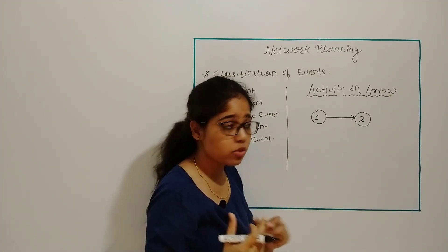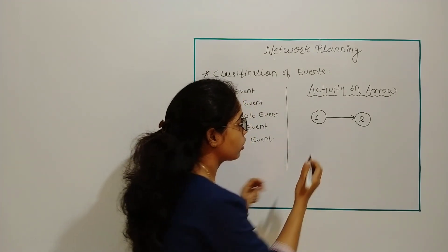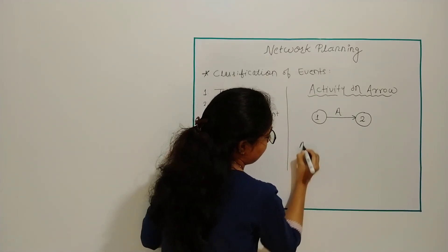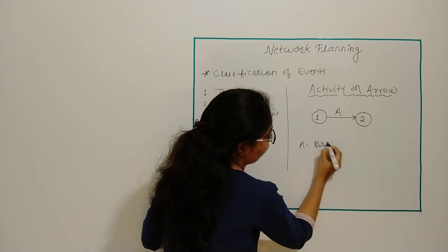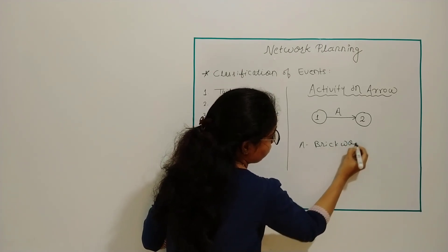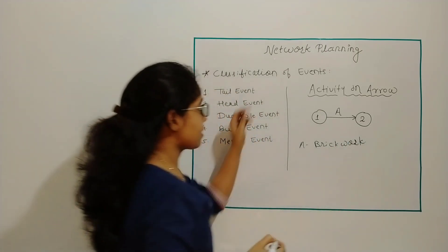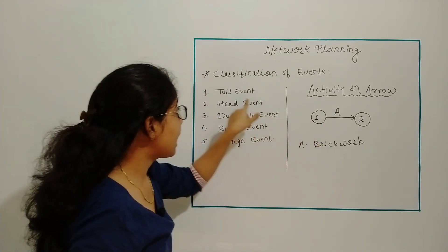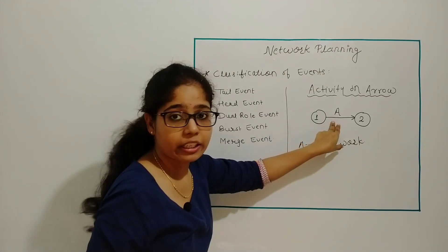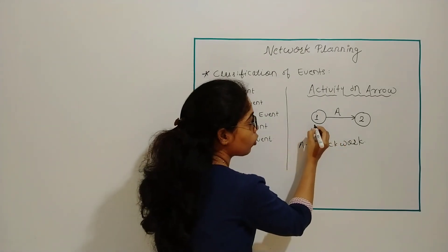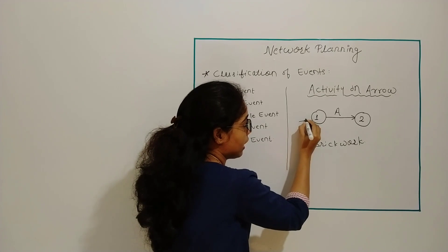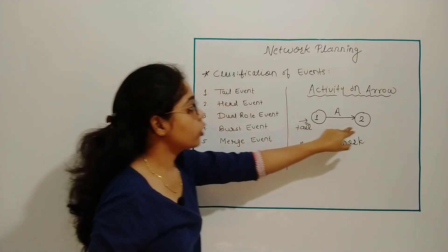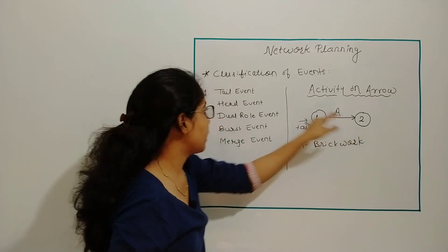Whatever activity comes will come under your activity on arrow. Suppose I am assuming one activity A, let it be brick work. Under classification of events, node 1 will act as tail event of activity A. From node 1 your activity will start, that's why it is called tail event. And node 2 is called head event of activity A.